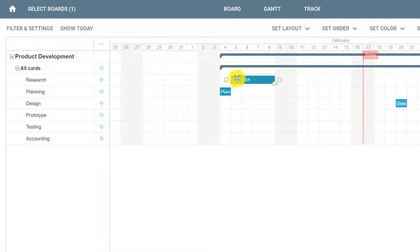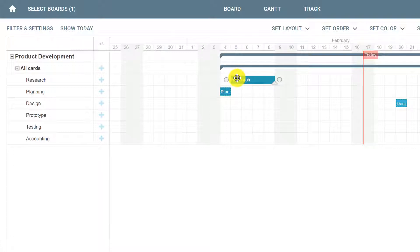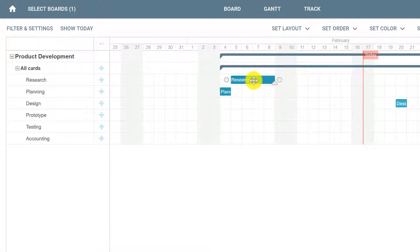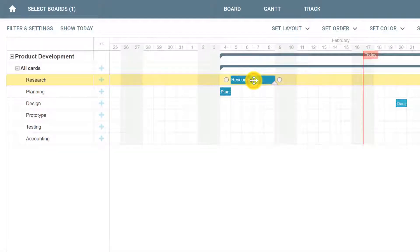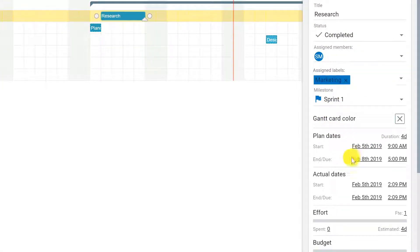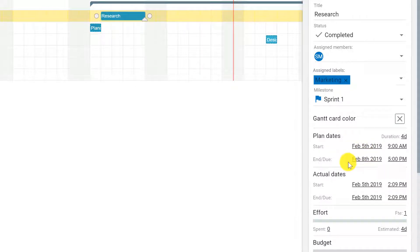It is clear now that the research card starts on February 5th and ends on February 8th, having a four-day duration. This can be confirmed by clicking the card and looking at the panel on your right, which shows a start date and a due date for your plan.